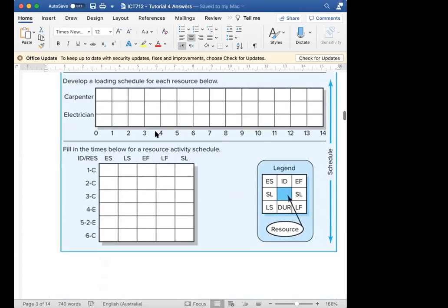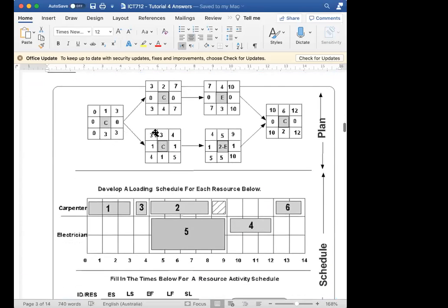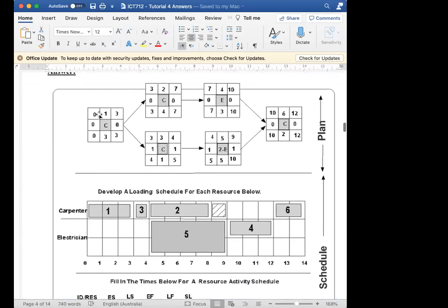So that's what we're doing, guys, here. You notice we use 1 first, 1 for 3 days. Then instead of doing that one, which will take much longer, wouldn't let me start using an electrician till day 7 and will only allow me to use 1 electrician, I do this one, which takes 1 day, which means very quickly in day 4, I could start using 2 electricians to do that activity.